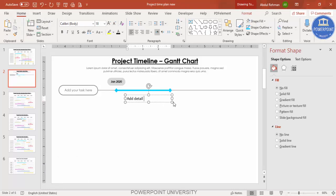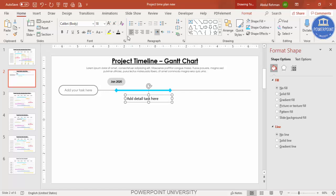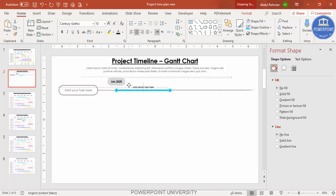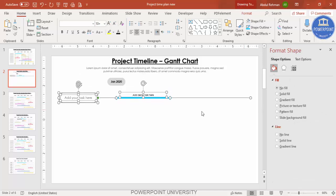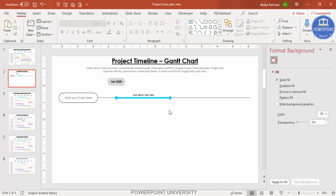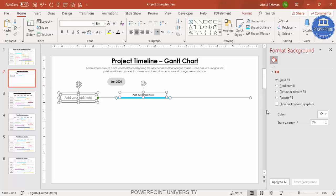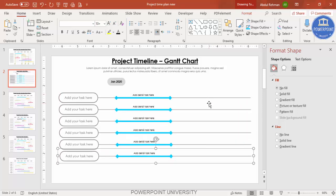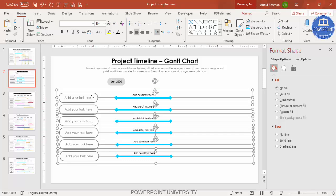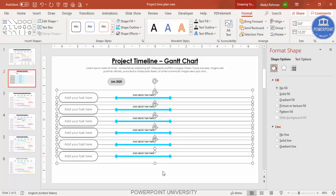Go to Insert Text Box and add detail task text, using Century Gothic at size 9 or 10. Place it exactly on top of the timeline line, moved down so it doesn't clash with the month titles. Select all these elements, press Ctrl+G to group them, then Ctrl+D to duplicate. Add one by one — maybe five or six tasks. Use Format > Align > Align Left, then Distribute Vertically for equal spacing.